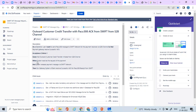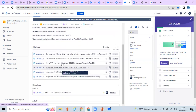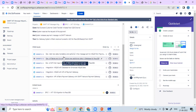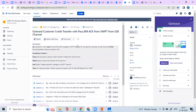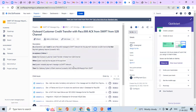That is what the first user story defines. For that user story you can have multiple tasks created - development tasks, testing tasks - and within development again, whether it is for the user interface, database, or server logic code. If there are multiple applications impacted, all those tasks need to be created and assigned to the respective persons. That is how you get this first user story done and dusted when it meets the acceptance criteria.